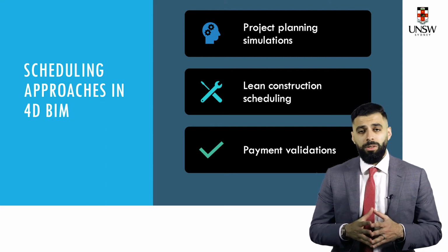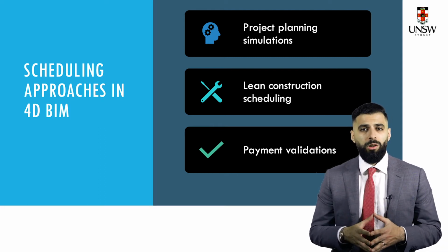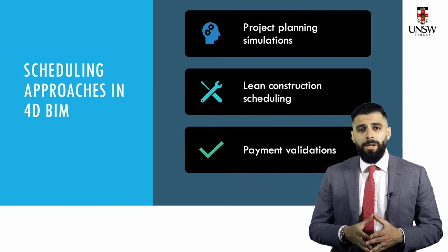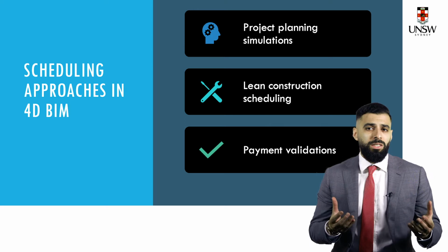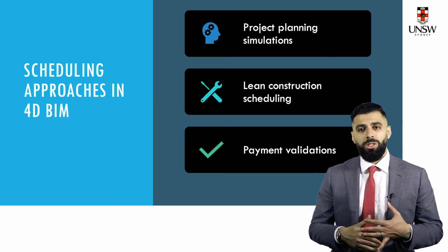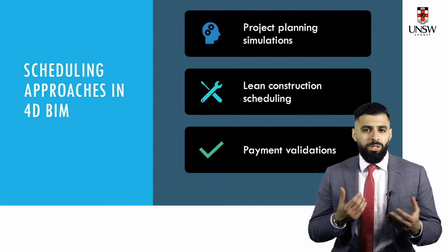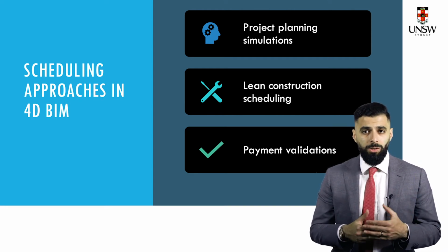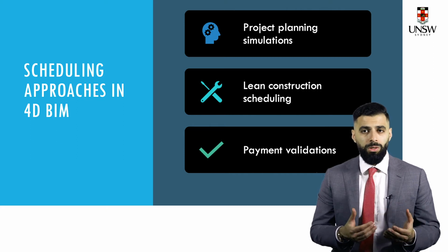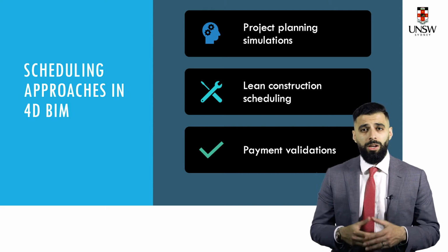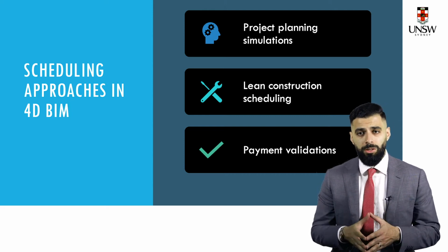Second, we have lean scheduling, which is a concept associated with minimizing time delays. A project can, for instance, be simulated considering just-in-time delivery of materials and machinery. Now, using this scheduling approach helps free up some space on your site, so reducing your inventory holding costs, and also allows the constant flow of resources required in various stages of the project.